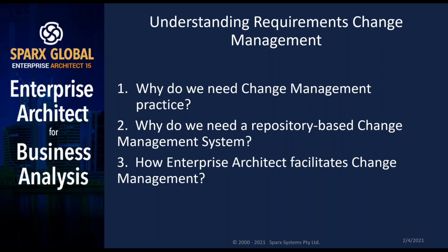And yes, they had to appoint an SAP consultant to do all these changes. So they ended up paying huge amounts of money just for this one change. Had an impact analysis been done, had they used appropriate technology to do the impact analysis, they would have avoided the situation. So this is just money, but think of systems where lives are at stake,